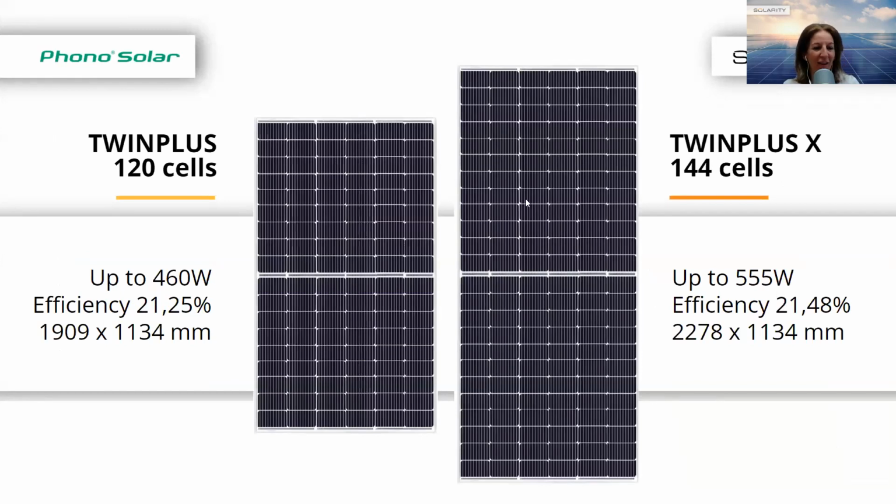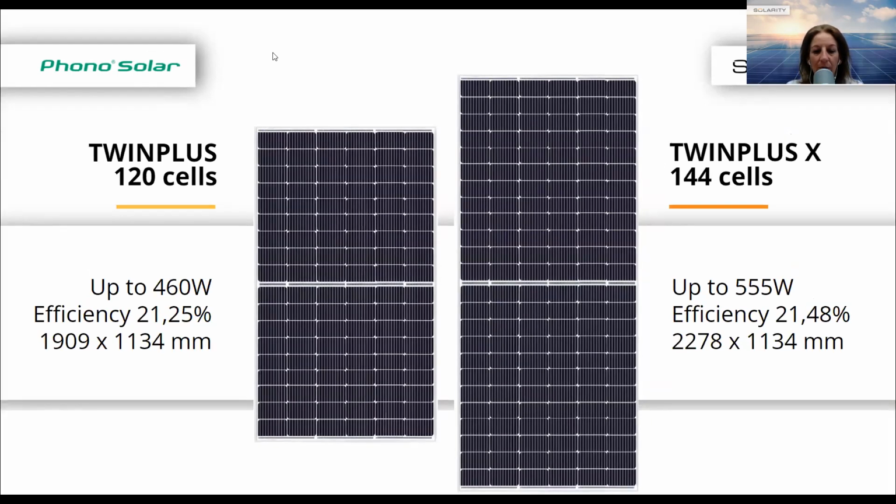And the last one in our portfolio is Phono Solar. Phono Solar is one of the top brands again in our portfolio. We cooperate with them from a different perspective. Most of the time we use them for project base. What I can say about why we like them is their strategy with the lead time: most of the lead time is between 10 and 18 weeks.